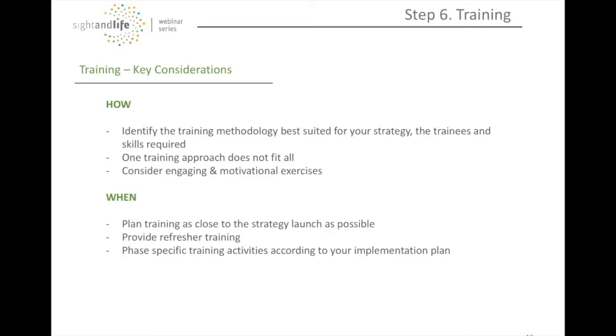Also remember that you may not launch all activities at the same time. Your training plan also has to include phases. You may, for example, train your cohort on specific outreach activities, but not yet on conducting cooking classes. Less is more when it comes to absorbing information. We all remember that from school. So keep that in mind when designing your training.